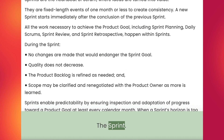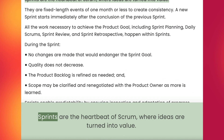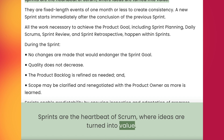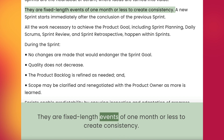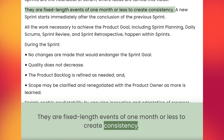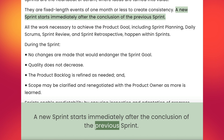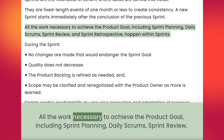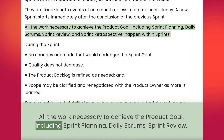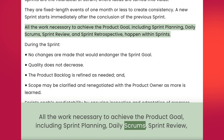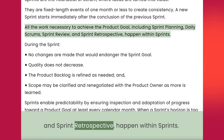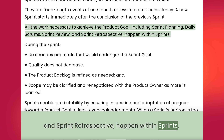The Sprint. Sprints are the heartbeat of Scrum where ideas are turned into value. They are fixed-length events of one month or less to create consistency. A new sprint starts immediately after the conclusion of the previous sprint. All the work necessary to achieve the product goal, including sprint planning, daily scrums, sprint review, and sprint retrospective, happen within sprints.